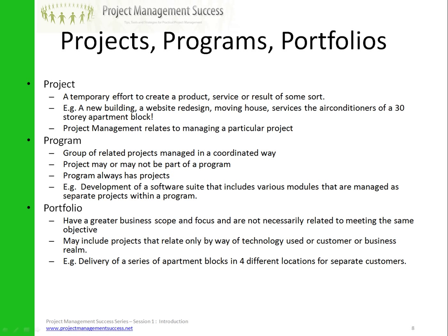Now when you talk about a program, we're talking about a group of related projects managed in a coordinated way. So the project may or may not be part of a program, but a program always has projects. So for example, if you're developing a large software suite that includes various modules with various functionality that are being managed as separate projects within that program, that's an example of a program.